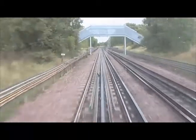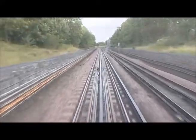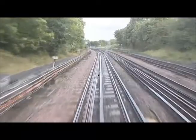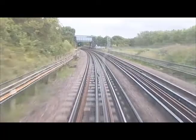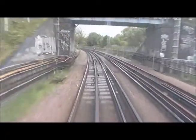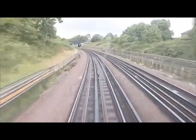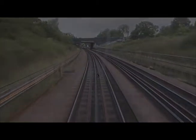Once all infrastructure works are complete, the engineer's railway will be lifted and all protection removed using the process laid out above. Remember, full details of protection arrangements are held in the Tube Lines Incorporation Protection Arrangements document. The procedures being adopted for this project have been approved and accepted by the London Underground Operational Standards Unit under an operational safety plan that justifies deviations from the Working Reference Manual. Remember, the standard permit to work system and arrangements are in force.